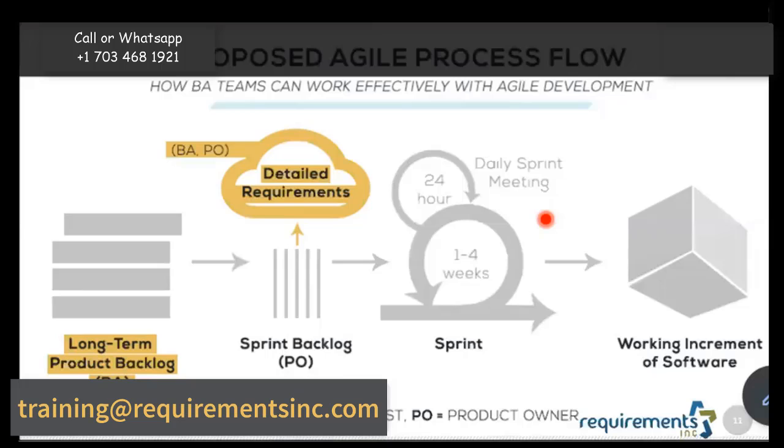Small things. So every time someone identifies a small thing, small suggestion, it goes back into this product backlog and gets its own priority. Something might be really critical, it jumps right on the top. So someone needs to take the responsibility of putting it in the right place, stacking the box in the right place. That is extremely important. And that responsibility lies with this person called product owner. Remember, we spoke about subject matter expert, your customer. In our IT phone example, phone system implementation example, the customer was your IT department, right?